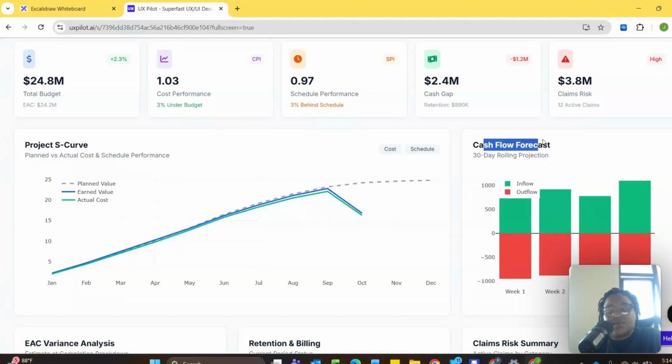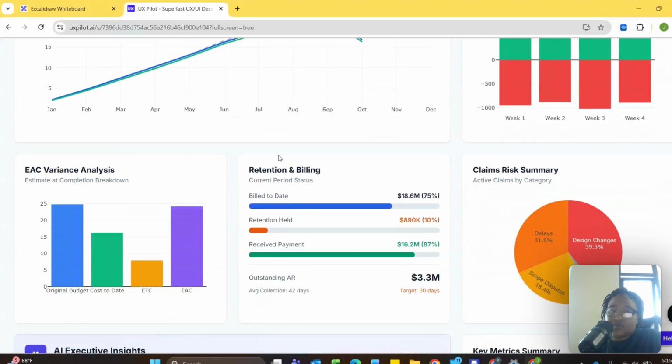This is the focus, like maybe the next month with the schedule and all that. Maybe in previous months they were behind schedule, so as to pull in front of schedule, there are works that are going to be compensated for. That's why here we are predicting a lot of outflow to come to the project. So if we have to be in front of the schedule, that means we need a lot of money to execute our tasks. So it's also important.